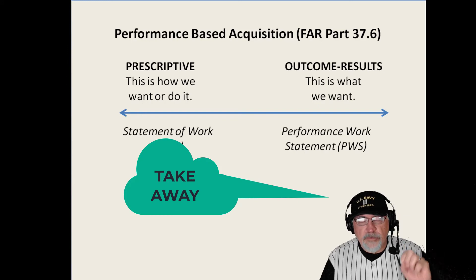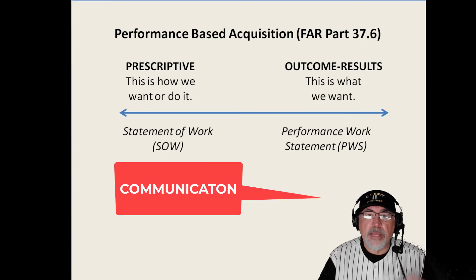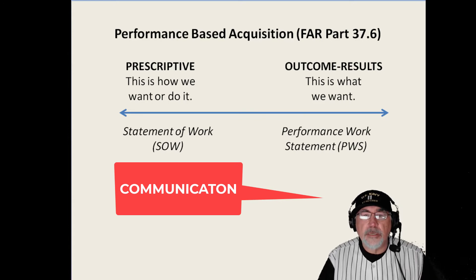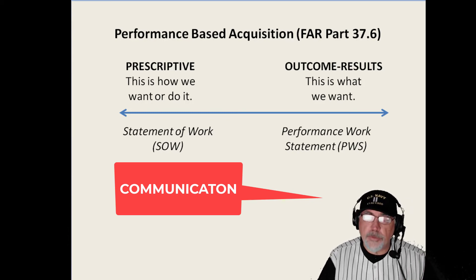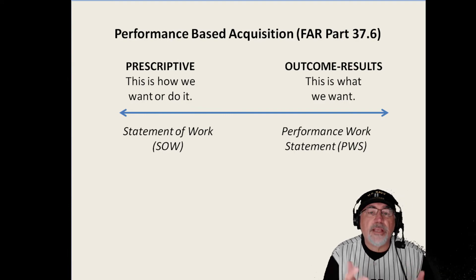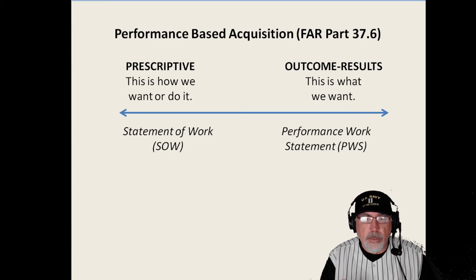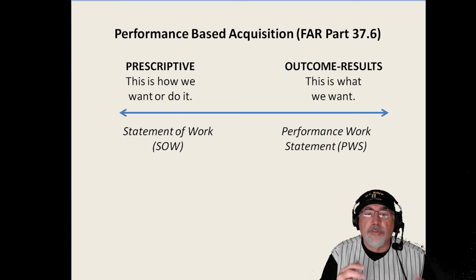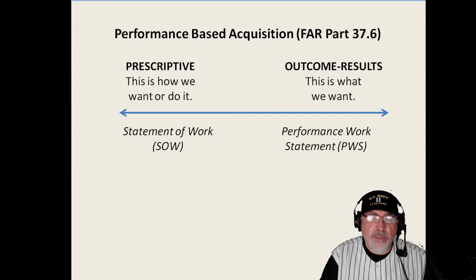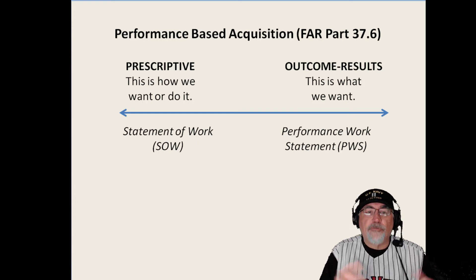Another key takeaway about the performance-based work statement is that it requires more communication. Communication is essential — you need to speak with your contracting officer or the contracting officer's representative about what's happening, where things are going, and any considerations or concerns they need to be aware of. The more you communicate, the better. A performance work statement also demands a different type of oversight from the federal government — they'll have a quality assurance surveillance plan, meaning they'll look at certain things at certain times.